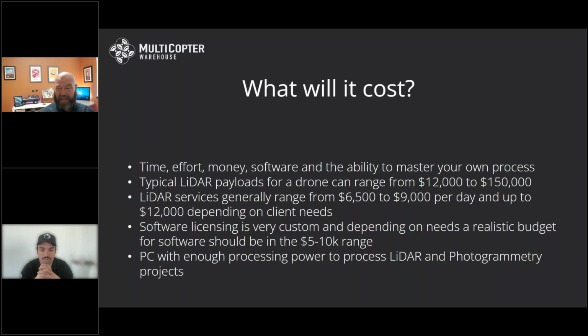If you were to outsource LiDAR services, I've done a little research. It sounds like, if you were to hire someone in your area to come out and fly a site, it could be anywhere from $6,500 to $9,000 per day, and up to as much as $12,000, depending on the deliverables and what you need from that provider.